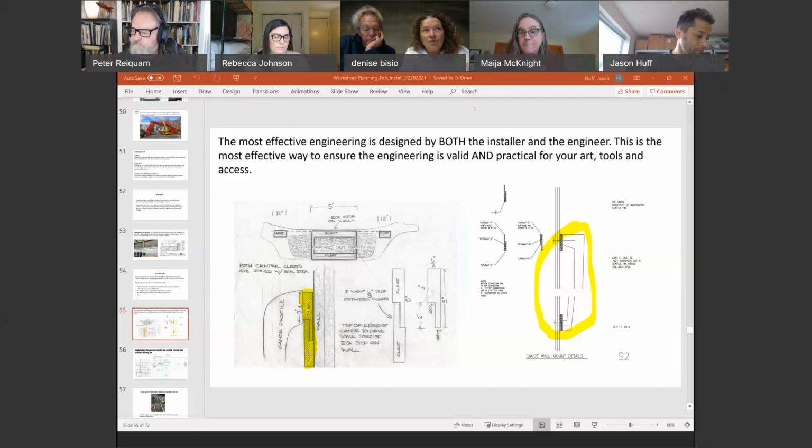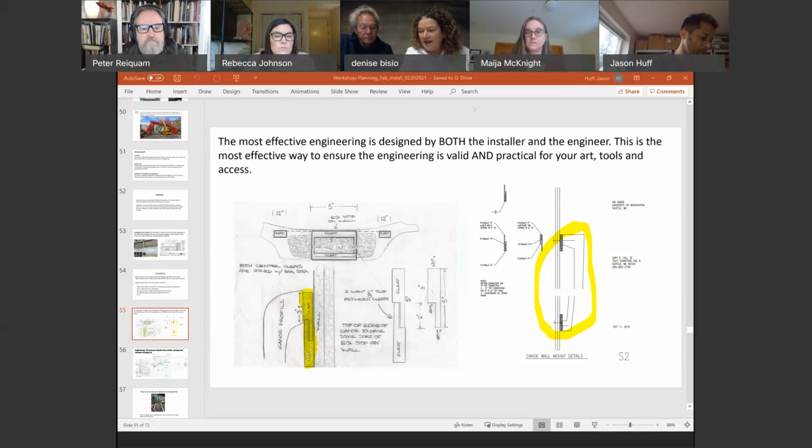I don't remember exactly how much the Hing Hay one was, but it wasn't that much. It was in the 50,000 range-ish. The transportation was a big chunk. It took, was it 2 weeks? It was almost 2 weeks on site. So that obviously adds up.